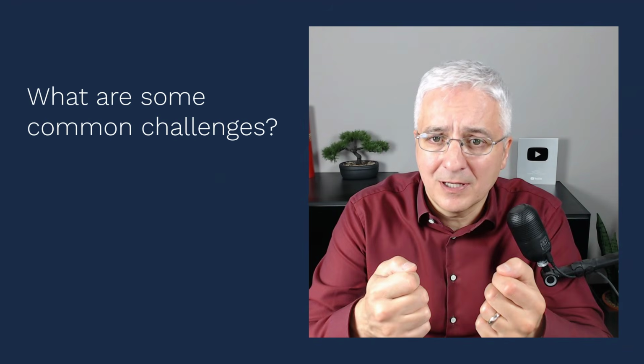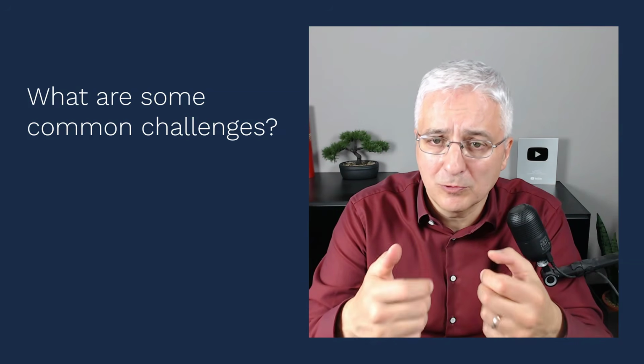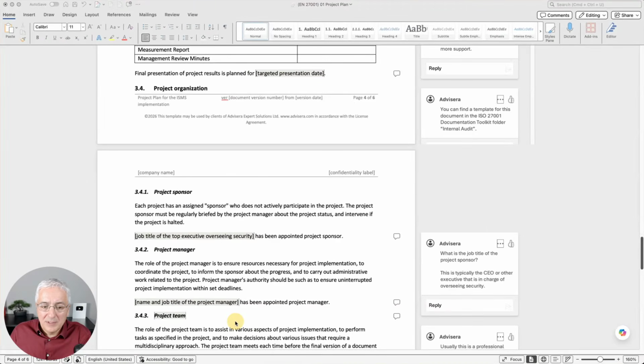Okay, let's see now what are some common challenges and how to overcome these challenges. The biggest challenges, from my experience, are usually when companies nominate a wrong person who is not really a good fit for this project manager role. Sometimes it happens that they nominate, let's say, some intern, a person with only a couple of months of working experience. And that usually ends up badly because this person simply doesn't know how to organize things and doesn't understand how the company operates.